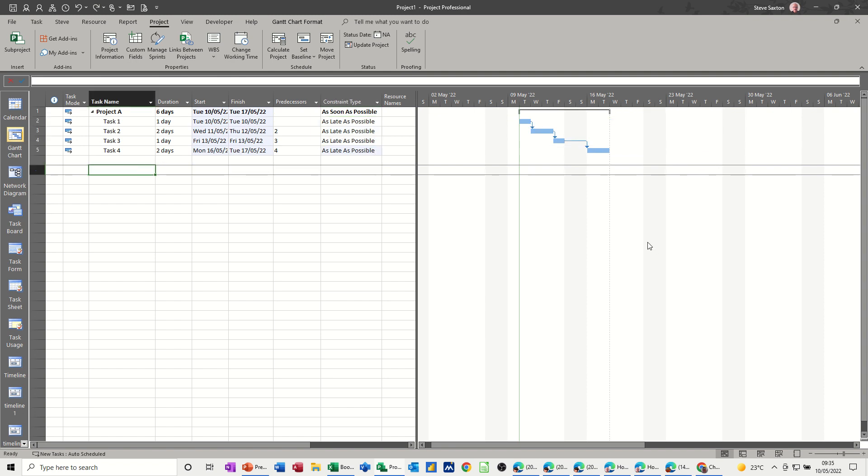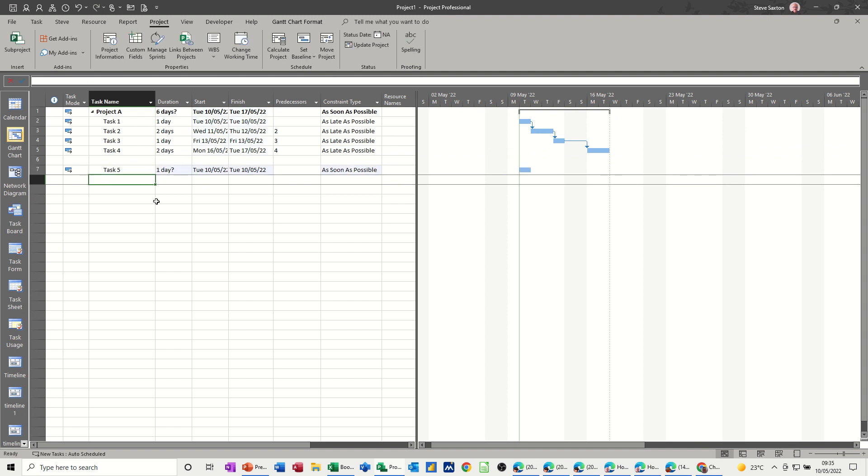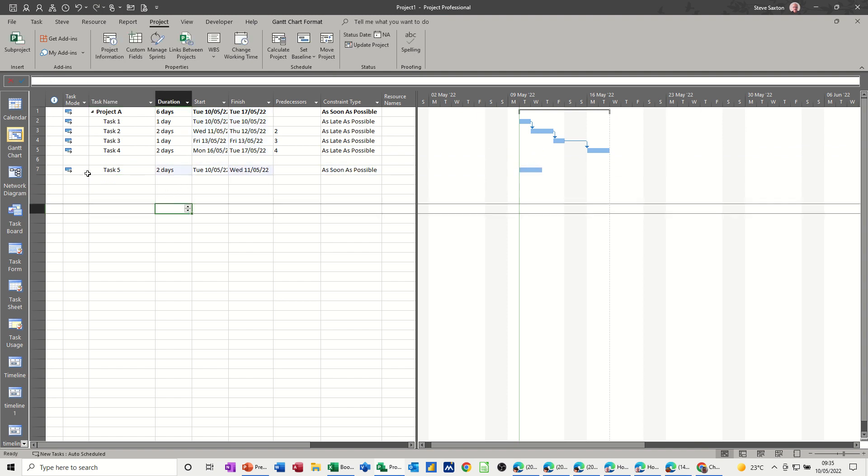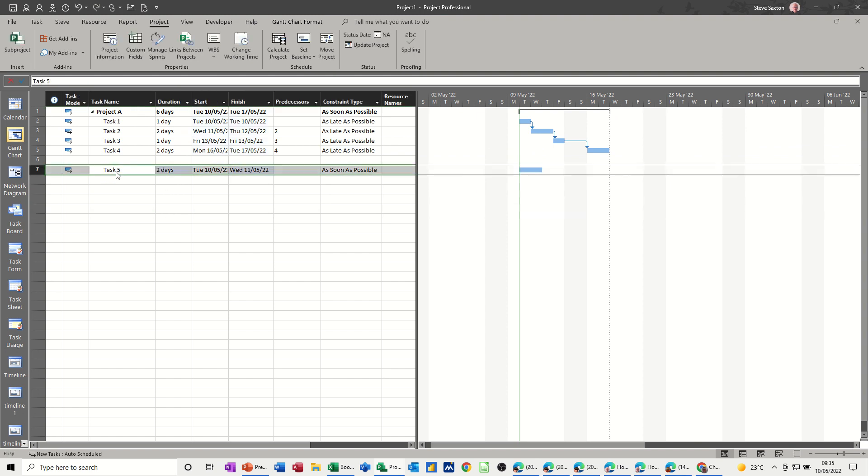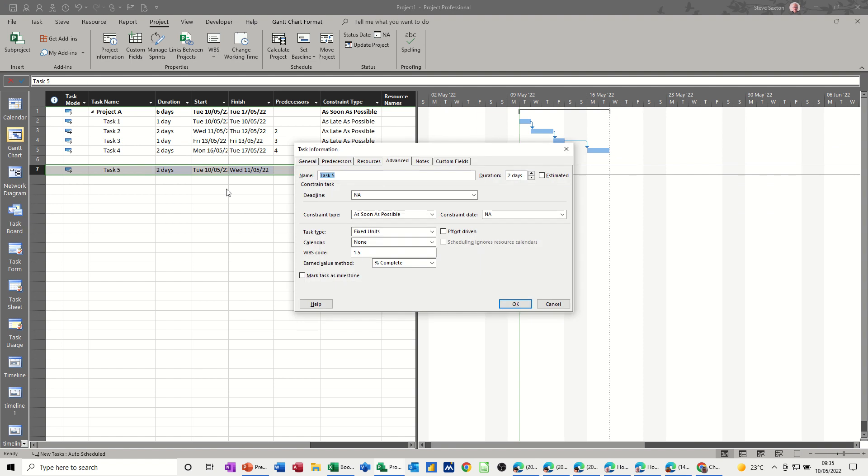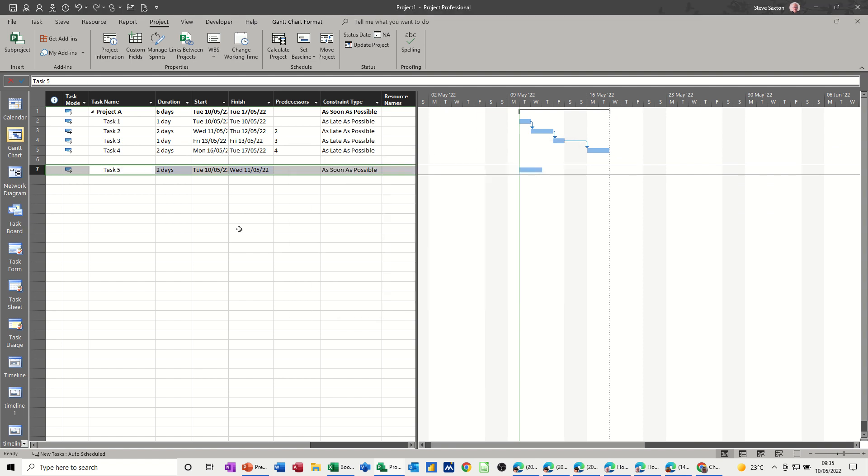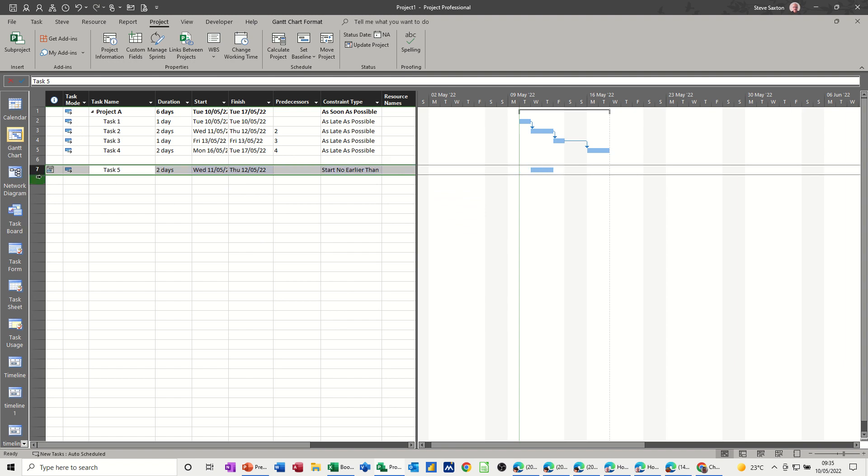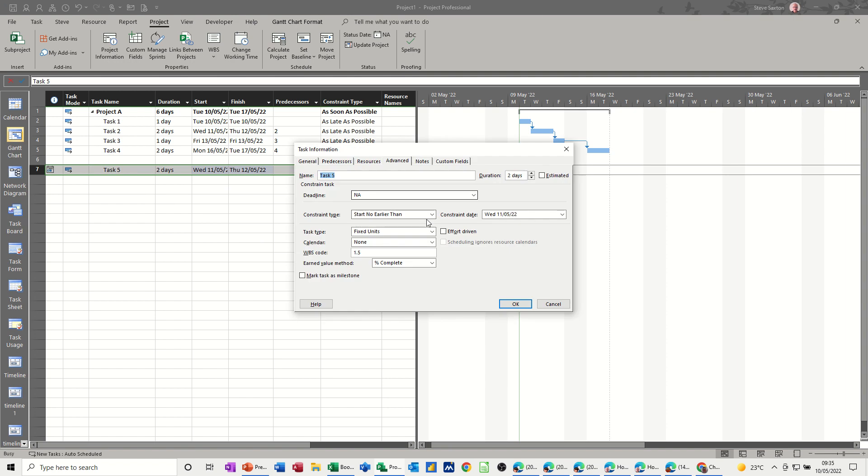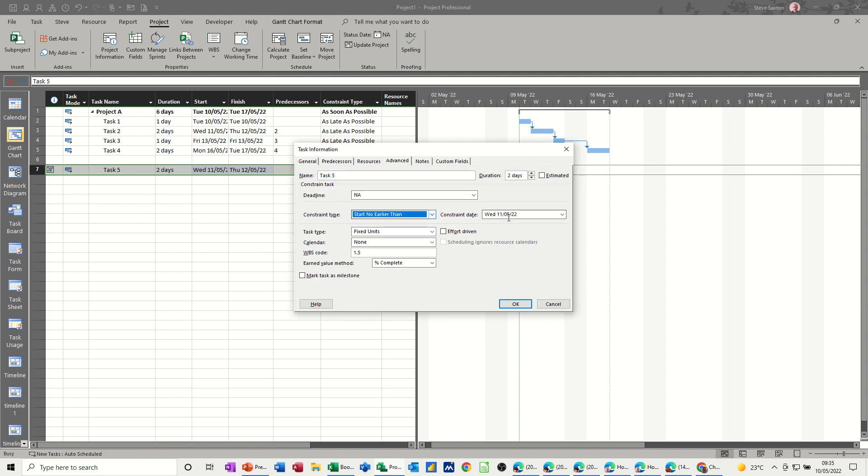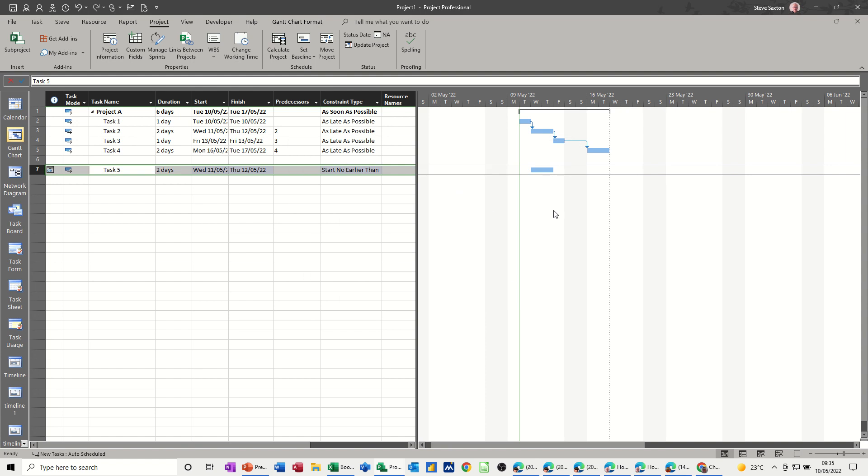If I put task 5 in there, just say that's a 2-day task. There's no constraint on that, that's default, if I just double-click into it, it's as soon as possible. As soon as I start messing about with this on the Gantt chart, it puts a constraint on, starting earlier than in this case. And that's just a representation of what's in here. Because I've moved it, and I physically give it a date by moving it. So that's now put a constraint on. So you have to be careful when you're moving these tasks.